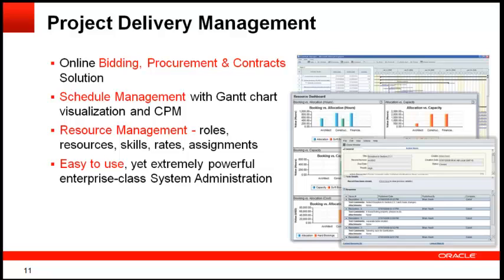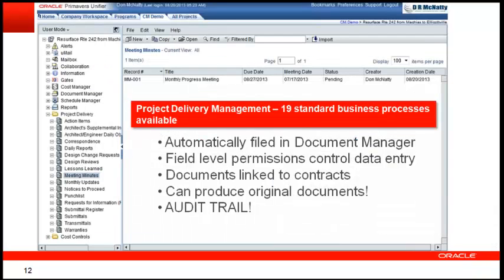Resource management we haven't even touched on. We know it's not integrated with P6. It is intended for how you would manage your own resources across all of the projects that you have in Unifier. So I actually see it as a separate resource management from what I might load onto my schedules in P6. This would be my internal company-wide resources that I'm managing. So we'll get into that more in one of the upcoming webinars.